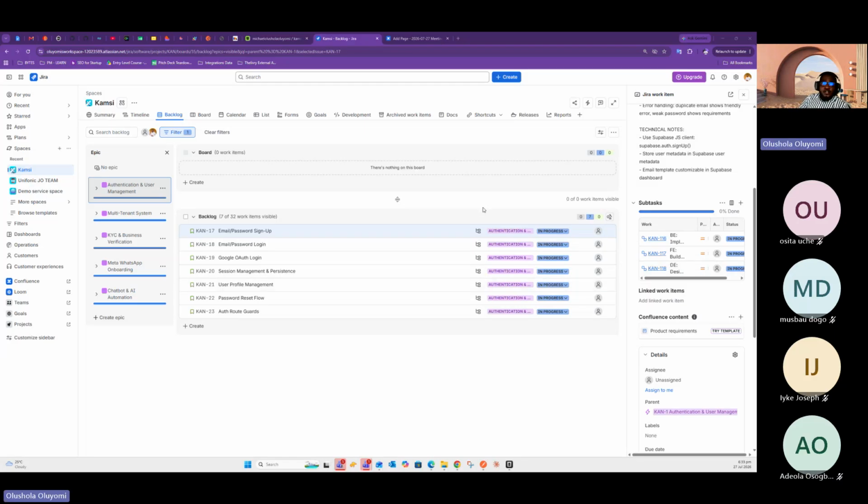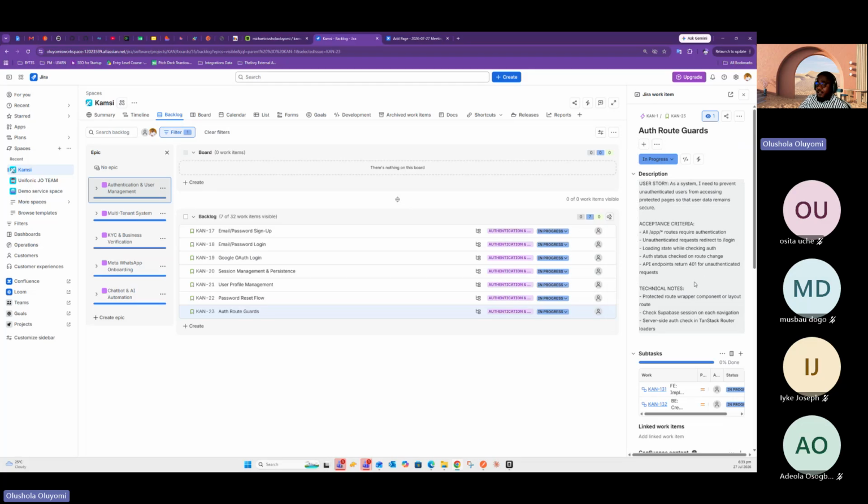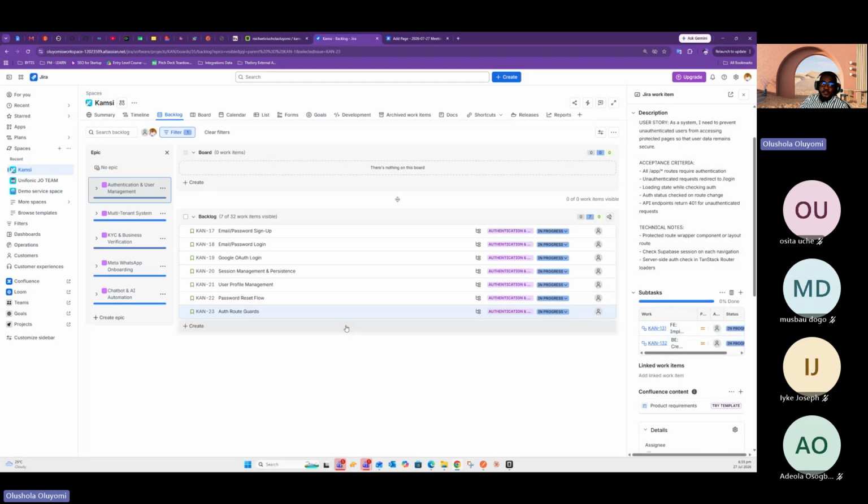Okay, thank you. So you have that epic, and then this epic is connected to user stories, depending on your company's board. You might have technical user stories, or normal user stories. Regardless, they are user stories. Technical user stories are ones you don't need as a user because they are very technical, can be infrastructure related, and often don't affect the user itself. So we call them technical stories.